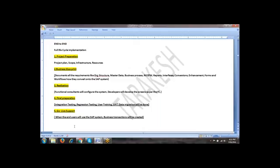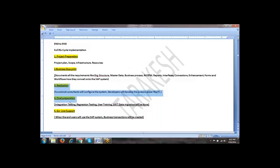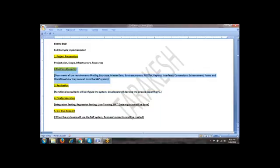So where is the test data created, like which phase? Once the realization phase is done, means it is in development server. After that, it will be moved to quality environment. There, you will create your test data based on the business blueprint and business process master list. What are those things? You will understand in the latter part of the sessions because it is still here in the beginning.